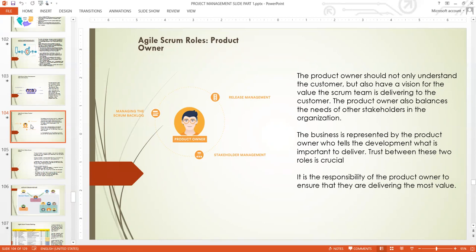Trust between the product owner and developers is crucial — the developers must trust their product owner and the product owner must trust the people working for them to deliver value to the stakeholders. The product owner is like a bridge — stakeholders and customers talk to the product owner, who conveys value information to the developers in the form of a backlog, the developers produce value, and the product owner delivers it back to the stakeholders. It is the responsibility of the product owner to ensure the most value is being delivered, and it is the product owner's duty to cancel an ongoing project if it is no longer delivering value.